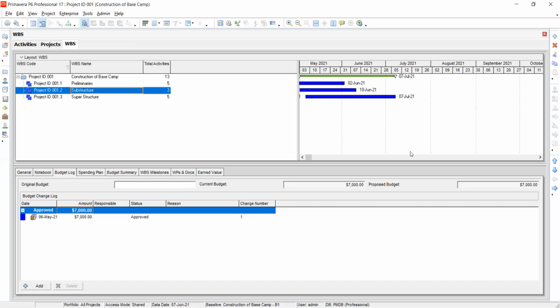So now it is from the budget you've got. For example, if you're executing a project and the government is your client, then the government gives you $2 million, and you spend all of it, but you still have workers on site. Does that stop them from earning, or from demanding their money from you? It doesn't. So this is just a budget. It's not the cost.